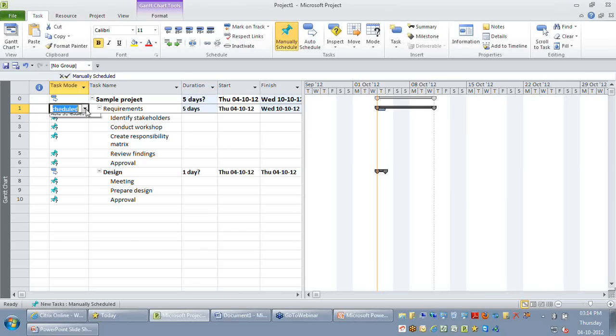And on my sub-activities, I can give any data on duration, start and finish. This is needed when you're preparing a proposal, when you might not have much detailed information, where you want to push information into Project 2010 and you may not want project to interfere and calculate the dates.